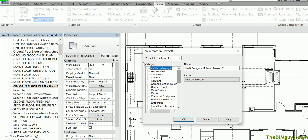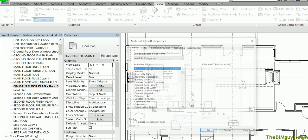Now I want to figure out the total gyp or sheetrock in this residence. Now we use the sheetrock or the gyp on walls and on ceilings and on fur downs etc. So I have to make sure that Revit goes out and gets all those pieces. So what I'm going to do is use what's called multi-category. This is very powerful in Revit for quantifying things across multiple categories.